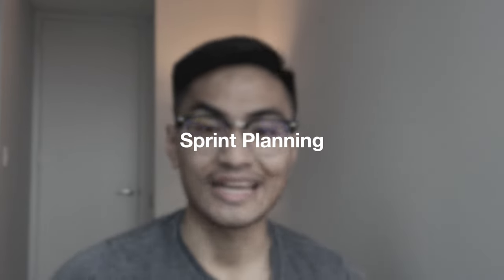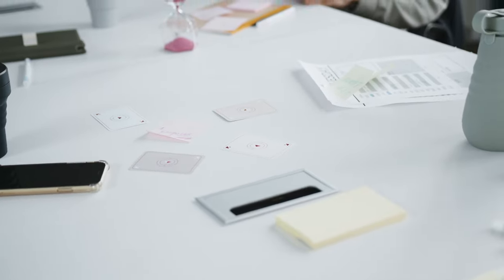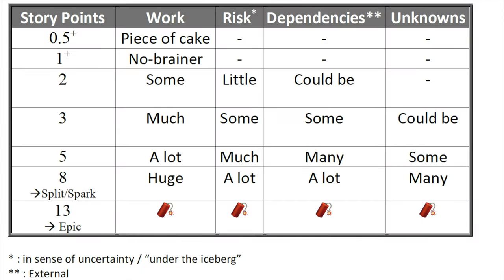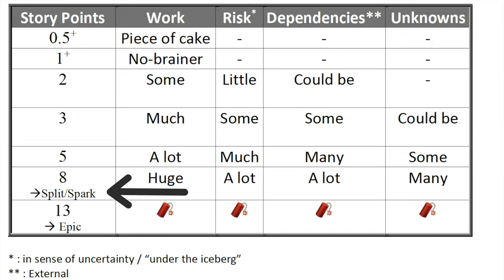The third meeting is going to be called a sprint planning meeting, usually coming after a sprint grooming or refinement meeting. In this meeting, you and your team are going to be using a method called planning poker to give points to the stories that were defined and refined within sprint refinement meetings. These points determine the complexity of the stories based on Fibonacci numbers. A one pointer can be something with the least difficulty — not a lot of acceptance criteria, accomplishable within a shorter timeframe — whereas an eight pointer or even a 13 pointer can take a whole sprint or more because of how challenging it is and the different moving pieces within the story.